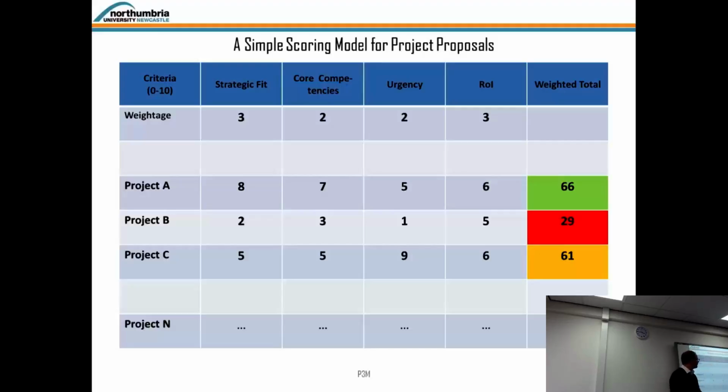This is just given, so keep in mind, this is a multiplier that goes into the hundreds. So if you have 1, this is basically the value you want to give it. If it's 2, it's times 2 basically. It's a 200% importance then. So if you have 8, this will dominate, of course, a matrix like that. That's a very simple linear model. There are more sophisticated ones.